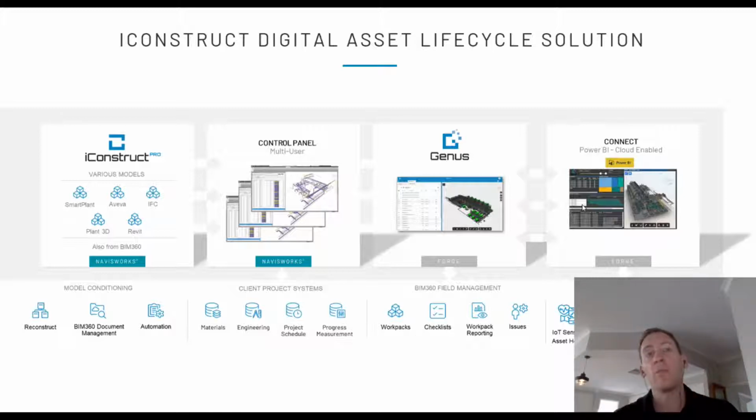The next being Control Panel, and Control Panel is really around visualization of constraint management, and then enabling the user through the use of Navisworks to then create IWPs or any work pack for that matter. We've spent a lot of time in the installation work pack space based on the different data that we're ingesting and aggregating together from project control, engineering, material, schedule, progress measurements, all sorts of things, to then make a more intuitive decision when it comes to creating IWPs and then compiling the data associated to it.